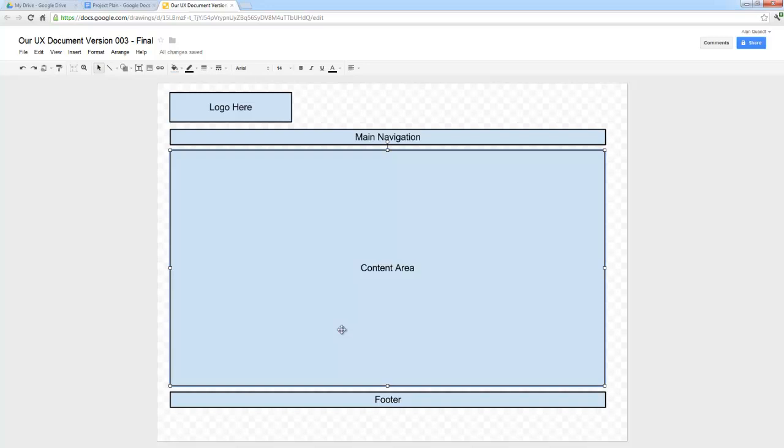Once we get past this step, make sure that the design itself, made in Photoshop or Illustrator or whatever, is completely signed off on, and they are totally aware of what they're getting before you move on. Otherwise, you have a lot of headache with contract and money and all that jazz, and hours. So it's just a good thing to keep in mind.